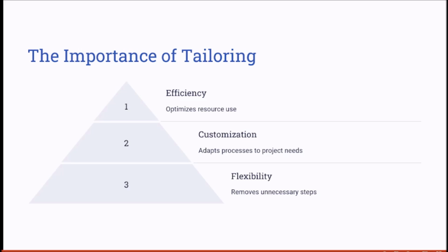On the other hand, a government infrastructure project will require a detailed procurement plan, stakeholder approvals, change management plans, and risk management processes to meet the compliance and regulatory standards. So, understanding when and how to tailor a process ensures that the project remains structured without becoming overly complicated.